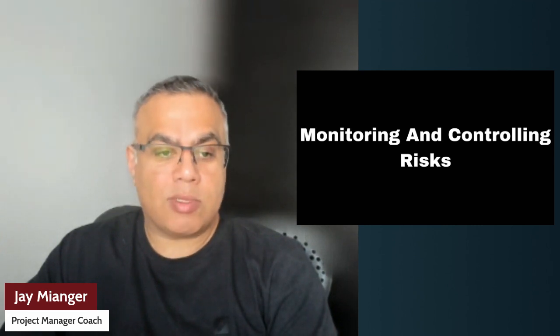It doesn't matter what anybody says, every project will have a degree of risk. It's how easily you identify it and how best you manage it. Overall, I've given you a quick introduction and a definition of what risk is. Those are pretty generic, but ultimately risk is anything that's going to impact your project, either physically, materially, or financially, that you need to assess, and that's going to take you off track. And as we said, the process is: identify the risk, assess the risk, develop the risk response, and then monitor and control throughout the project life cycle.